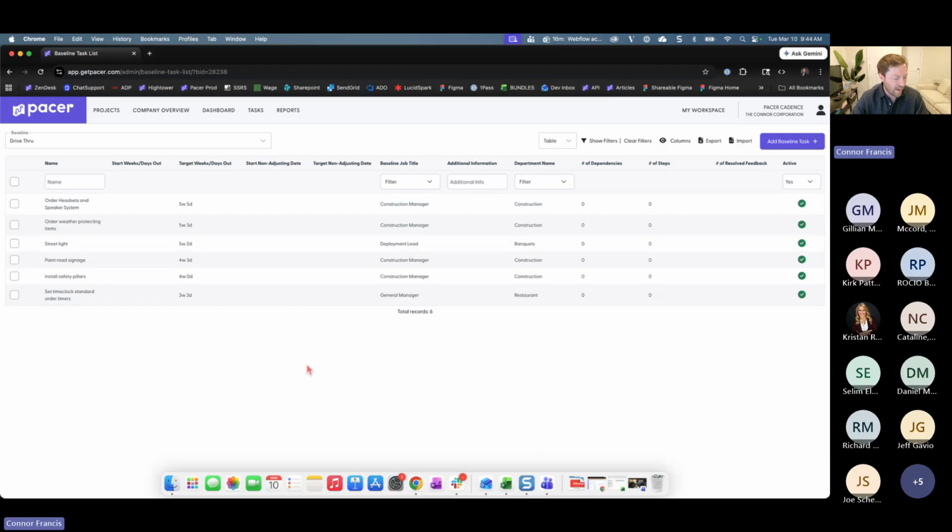Oh, that's a great question. I think something interesting is we can say, hey, you've been working on a one baseline structure. I can tell you that of the 10 locations you opened, 5 of them are always marking this task as not applicable. That might be something to start with. If a lot of people are marking this task as not applicable, maybe that's something we consider moving off.